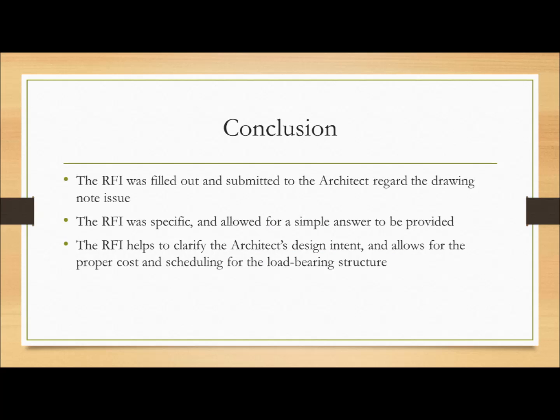For this example, the RFI was filled out and submitted to the architect regarding the drawing note issue. The RFI was specific and allowed for a simple answer to be provided. The RFI helps to clarify the architect's design intent and allows for the proper cost and scheduling for the load-bearing structure.